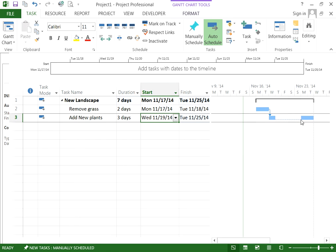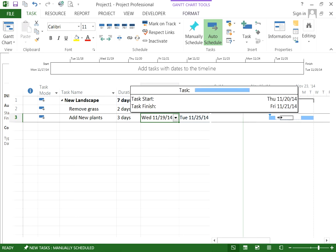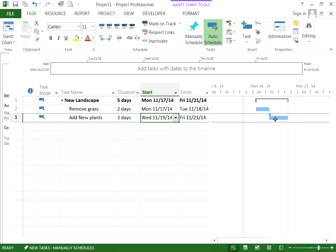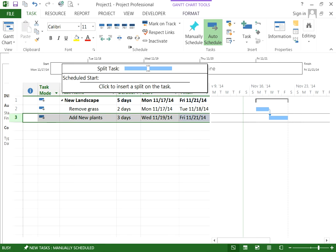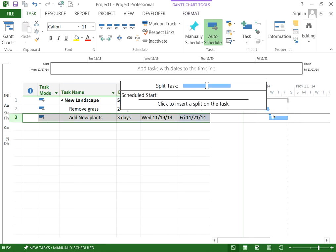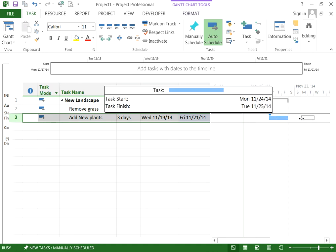To put it back, you do the same — just click and drag it back. So let's go ahead and do it again. We'll split the task after the first day, which is Thursday the 20th, and drag it to Monday the 24th.